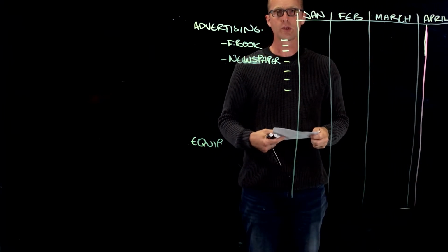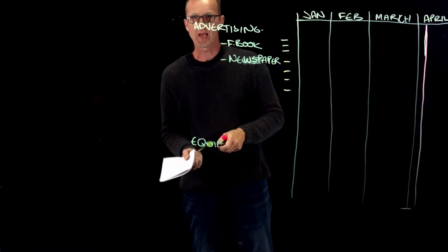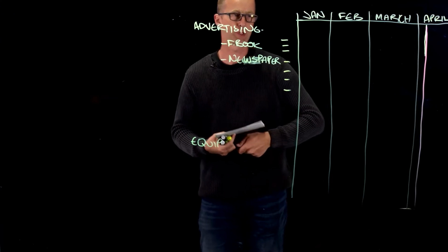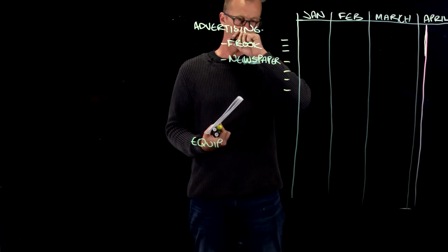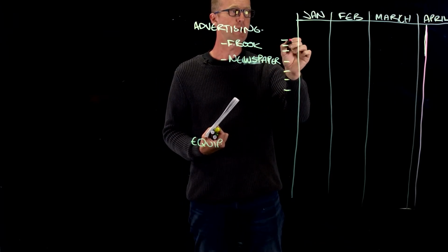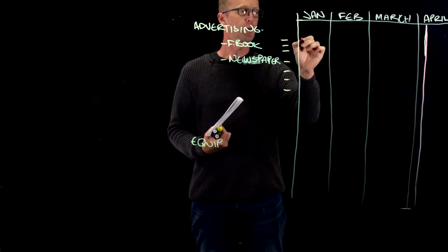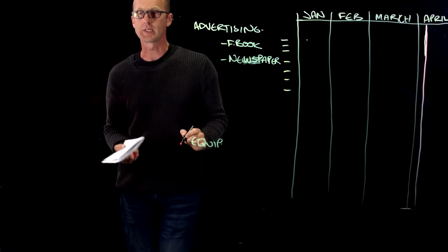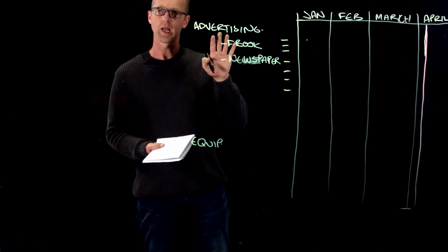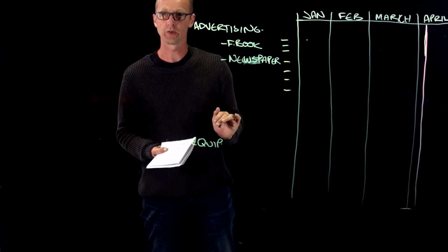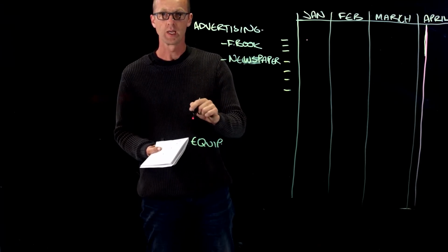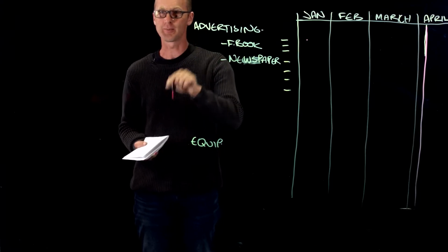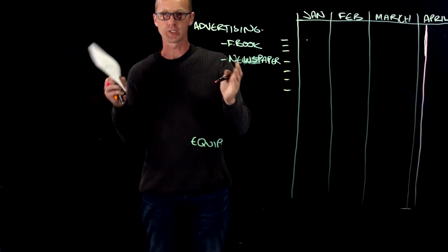Basically, you're going to map out when things need to be done. So if we think that the first component of Facebook needs to be done straight away, then we would put it about here. But the next question is, how long is it going to take? This isn't how long it would take sitting at a desk, I would argue, in community work. It's how long it will take between me asking a person to do it, them doing it, and me okaying it. How long does it take from start to end?